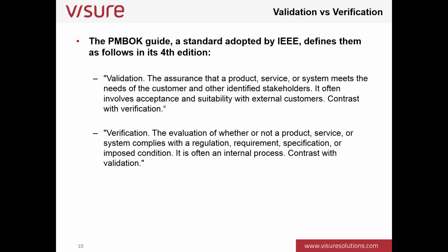You have to test it, but you also have to get the approval of the customer, and that's related to validation as opposed to verification. That's what we are going to be focusing on in today's webinar: validation. Even though those two concepts are usually mixed together, a requirement that is not well written, not well formed, an ambiguous one for example, cannot be verified and also cannot be validated. So those two concepts usually come together.